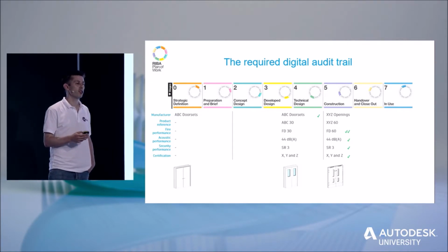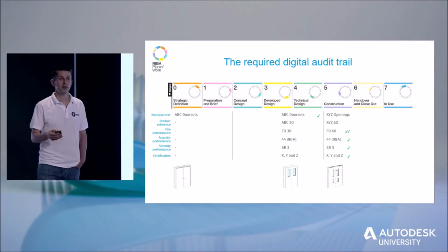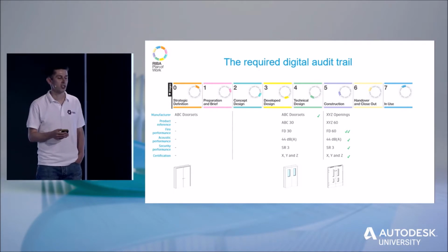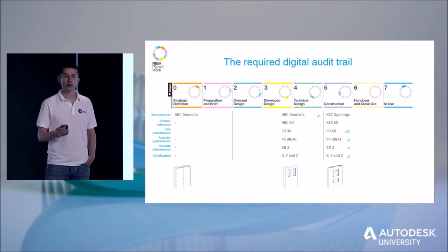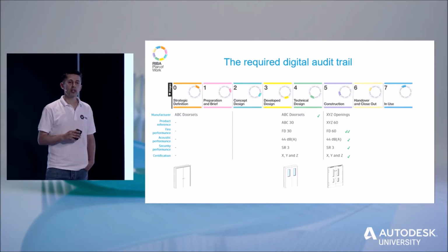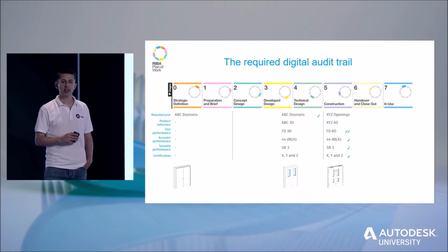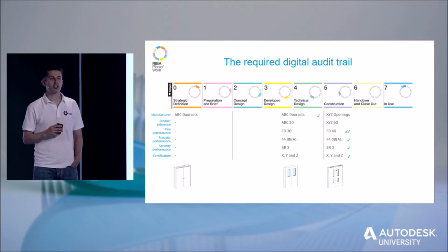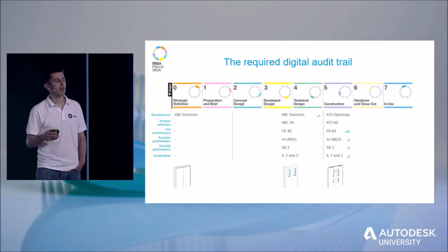Prior to construction, again, this goes back to the Hackett consultation documentation. Does the principal contractor sign off and say that the door that's been purchased is the same as the one that's been designed? In the case where it's not, are the rules of submittals followed?